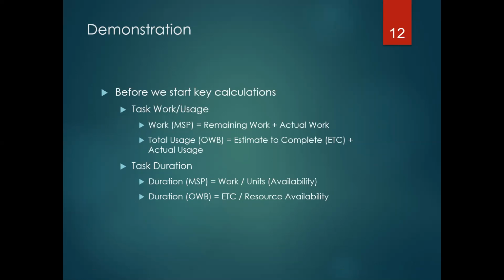Now, look at the calculation. If you're very familiar with Microsoft Project, you'll know that you can set the task type. You can set it to default to fixed duration, fixed units, or fixed work. It's an algebraic equation. Out of the box, fixed units is in fact the default, and I agree with that default.